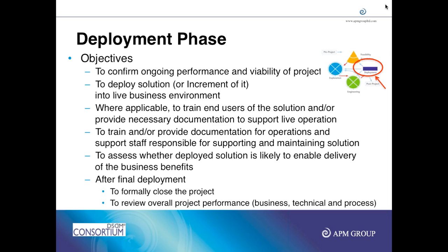Apart from that, you also make a plan that says after the deployment, what is the best time to go and look into the system to see whether it has solved our business problem, whether it has addressed it, and how effective the solution has been, whether it has brought the expected business benefits. So you have to make a plan for benefits realization.